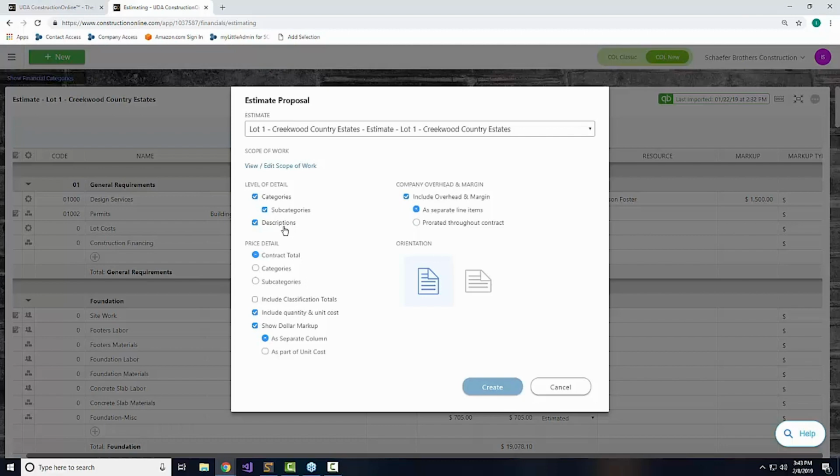Now, interestingly enough, you'll also find some great detail in the proposal for using some of the things like classification totals. Now, as we saw in that right sidebar, some of the information available here is going to be broken down by classification, and we actually have icons for this estimate view. This is a standard estimate. If you prefer a 5-column estimate, then you'll have columns for each of these major classifications. A material column, a labor column, a subcontractor column.